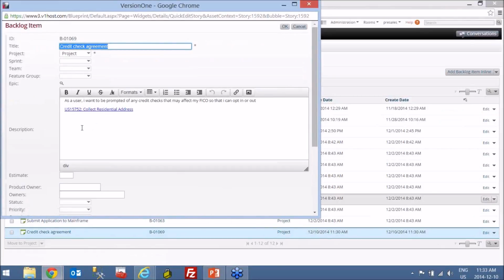I can see the comment that was put in. I can see the inline trace to that user mockup. So if I wanted to click on that, I could actually visually see that. And then as Paul, the product owner, I want to then look at it, plan it, estimate it. I'm going to put it into sprint 3, and I believe it's going to be 8 points, and the story is accepted. So again, adding this information into that.